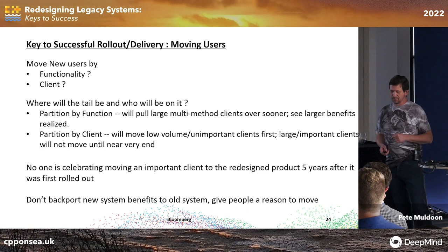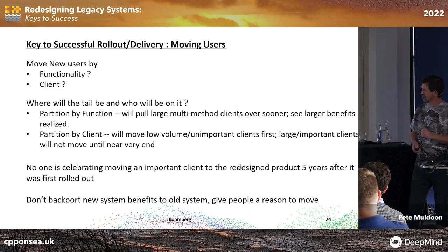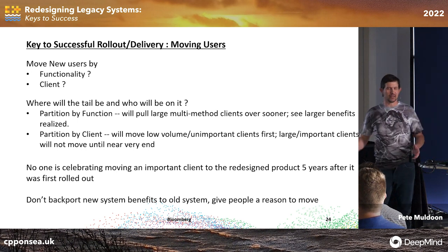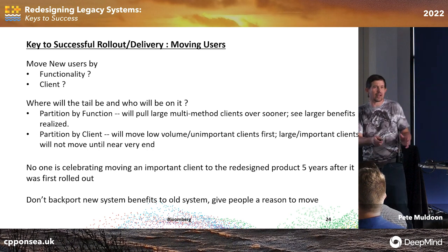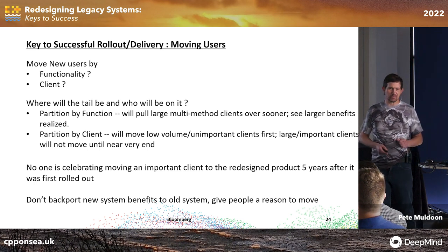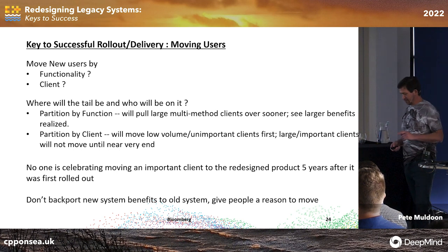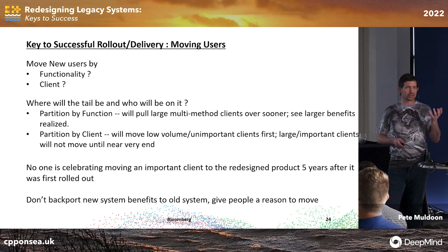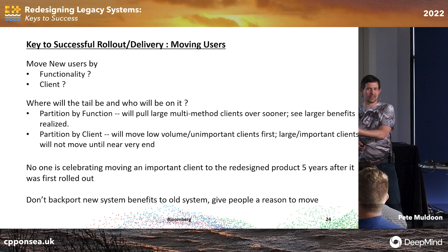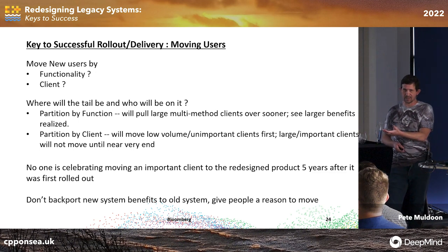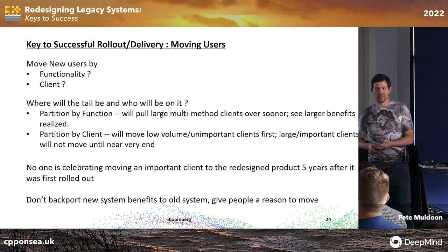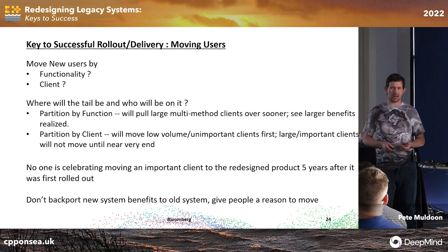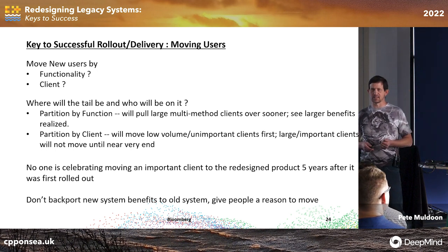And one last tip I will give you, doesn't really fit into this, but sometimes you'll be asked to backport new system benefits because you say, look how I did this. Wow, this is fantastic. Can you not put that in the old system? It's like, no. Right, that's the answer. Because one, you need to give people a reason to move. The other thing is if you think you're just going to take this small block of functionality and weld it onto the old system, which may not have proper testing, very organically grown, you don't understand the part you're going to try and meld into, it's going to take a lot longer, right? So it's got all kinds of reasons not to do it.